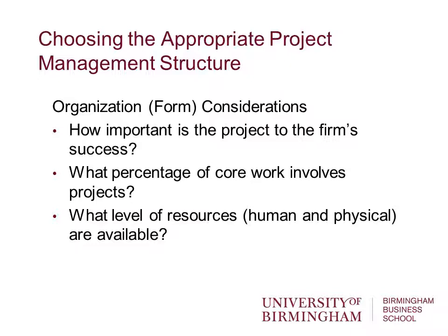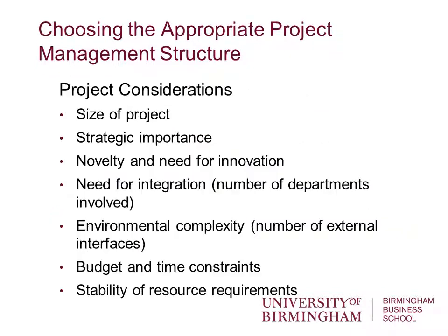Okay, so there's a lot I've talked about there, and the way to think about this is to think about some of the key issues around the appropriate way of structuring your project organisation. So we have organisational considerations. How important is the project to the firm's success? How strategic is it? What percentage of the core work of the organisation involves project activity, and what level of resources are available within the organisation to deliver a project? These are key issues which an organisation will think about.